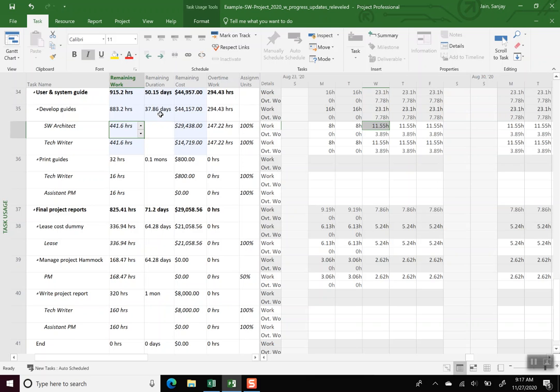And so once we did that, you see the remaining duration again changed. And now you notice on this side, well, they are somewhat more reasonable numbers. We allowed basically 20 hours a week of overtime, which is 4 hours a day. This is now close to 4 hours a day. But as I said, the variances are kind of changing our calculations here.